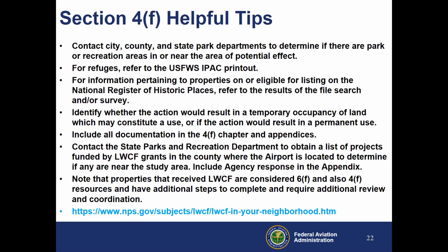Once you determine if you have a resource that has received those funds in your area, that's considered a 6F resource. It's also considered 4F. And then you're going to need to take additional steps to determine whether or not you will be impacting or using those resources and provide additional documentation, and it requires more coordination and approval processes with that additional property label.